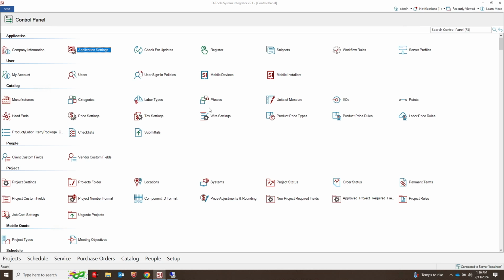But the point of submittals and why we set these up was a long-standing request, for many years, for requirements when you're dealing with architects or interior designers or any other trade. When you're working on a project, they may need certain documents from you or require that you provide them the spec sheets for all of the major equipment that's going into a project. An interior designer may want spec sheets or brochures that show color options, things like that, so that they can do their part of the project more effectively.